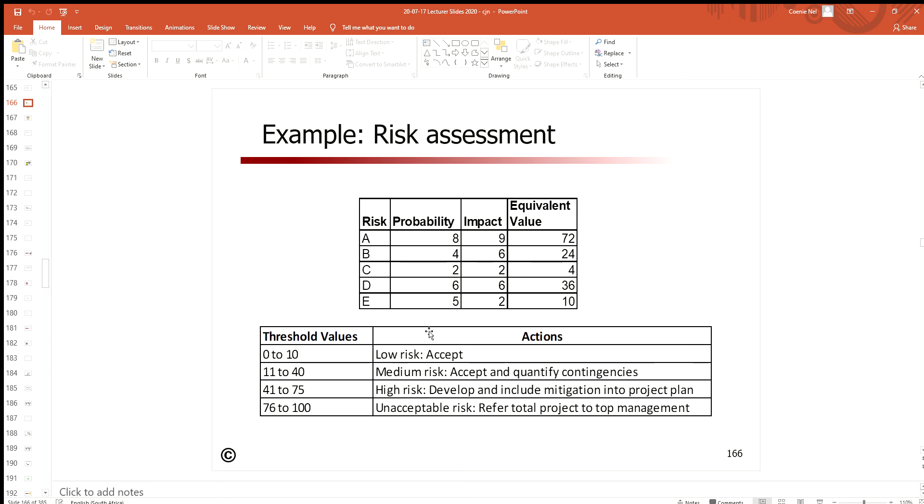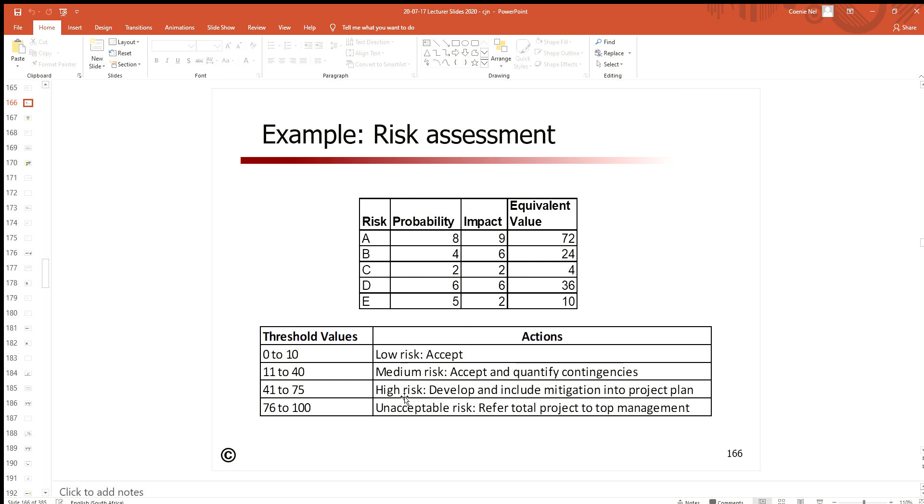If the risk or equivalent value is between zero and ten, we accept it—we do nothing. If it's between something else, it's a medium risk—we quantify contingencies. If it's a high risk, we're going to get mitigation in place before we start. If it's really high, it's unacceptable—we're going to transfer the risk to someone else to make the decision.